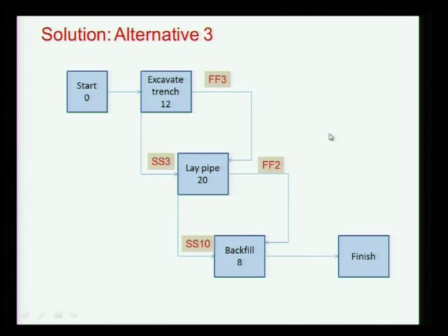Now there is software which will not allow you. So the difference between an AON and this is, now you have multiple relationships between activities. In the earlier case we only had one, so now you have the complexity. While you are saving on activities, your relationships are multiplying.